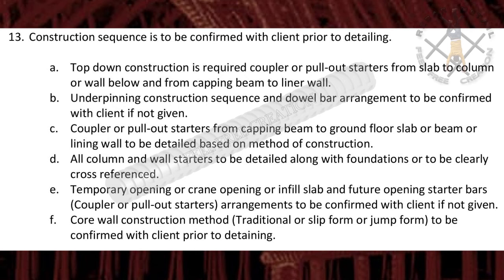Couplers or pull-out starters from capping beam to ground floor slab, beam, or lining wall to be detailed based on method of construction. All column and wall starters to be detailed along with foundations or to be clearly cross-referenced. Temporary opening, crane opening, infill slab, and future opening starter bar, coupler or pull-out starter arrangements to be confirmed with client if not given.